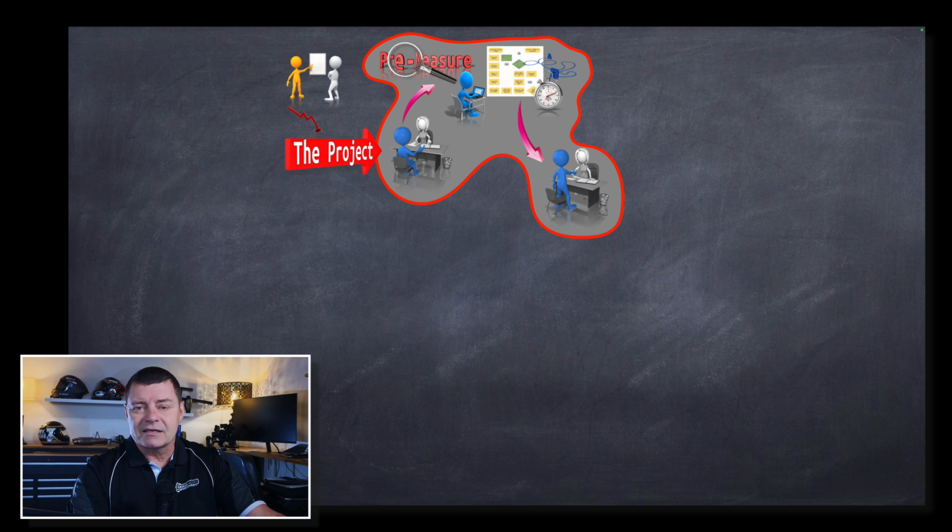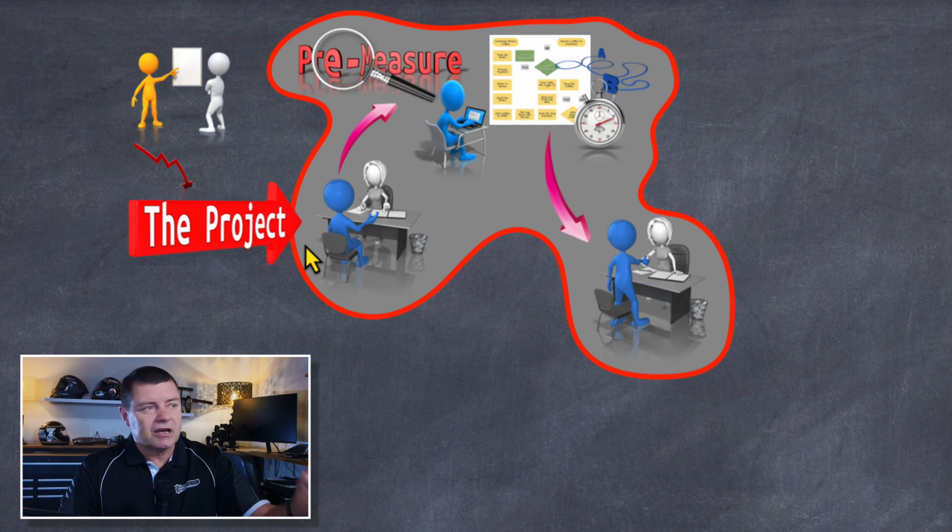Now, when they get this, let's just assume it's a business improvement practitioner of some kind, green belt, black belt, or whatever, depending on the framework you've got in your company. Then we guide people down the pathway of doing the setup phase of their project, which involves three fundamental things. The very first thing, and you can see it up here, we've got a visual representation of it. They sit with the project sponsor and kick off a conversation about what's the performance gap and getting information around the scoping of it and everything associated with putting a project charter together. So they will have that meeting. It's a formal meeting where they sit down and have that conversation.